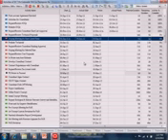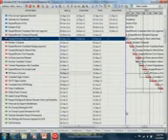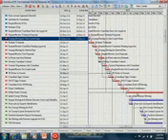And as far as being able to quickly zone in on what that critical path is, there's a standard filter in your project schedule where you can say, show me only critical activities, right? And so if I were to go into my filters section, okay. So typically in Primavera, your critical activities are going to display in red, right? That's the default setting.